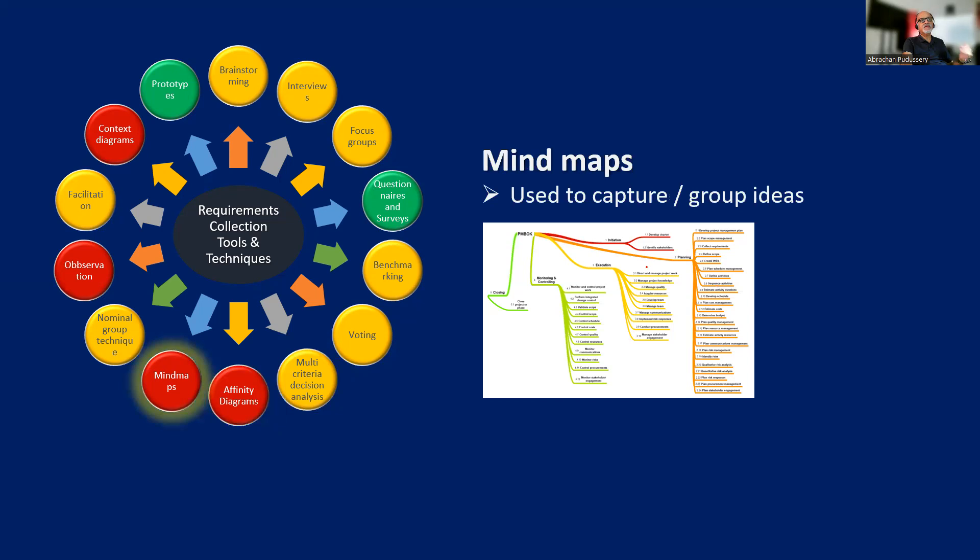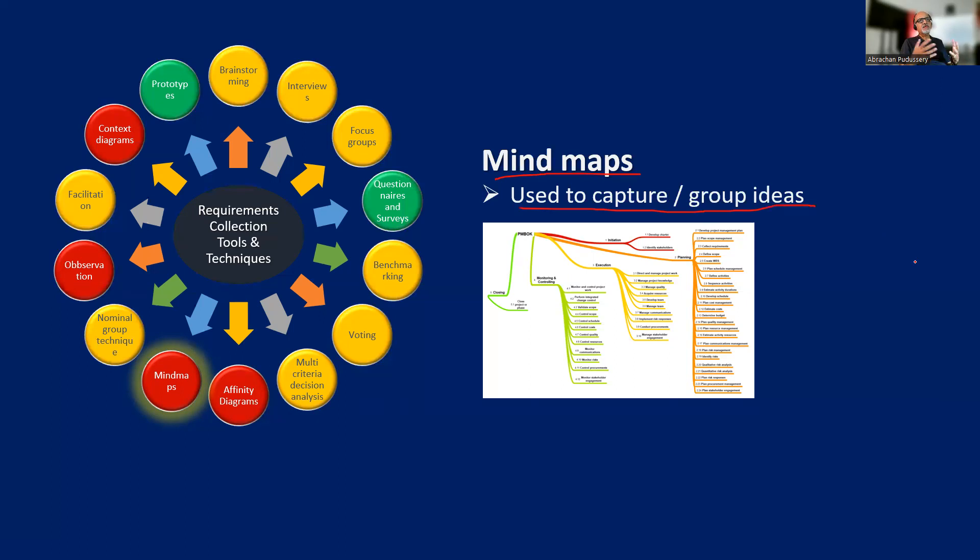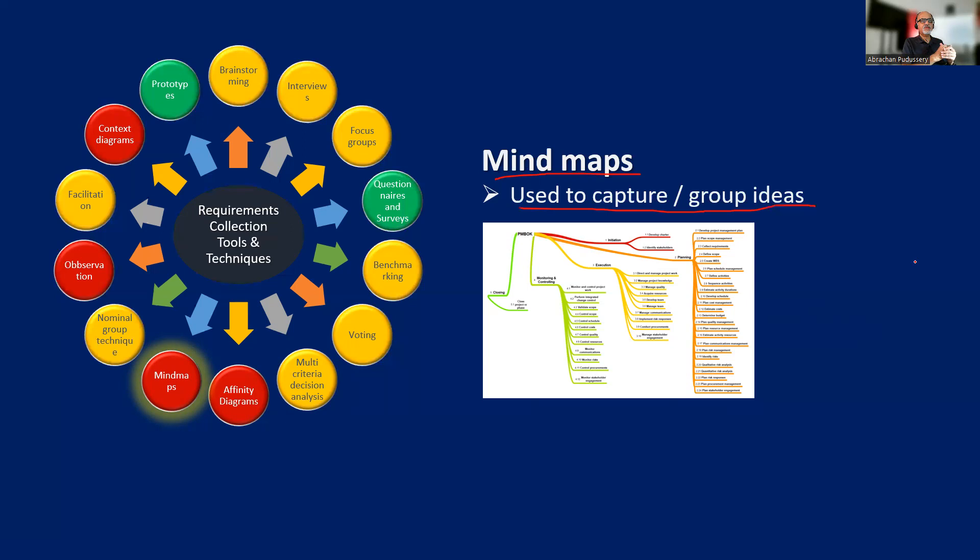Then we have mind maps. It is used to capture or group ideas. I've used mind maps extensively, even before writing or developing a white paper. We have to identify the various sections, then subsections. So basically, we have to design that white paper using mind maps. This is a great tool for consolidating the output of brainstorming sessions as well. We can group ideas and strategies based on their affinity and present it to other stakeholders.